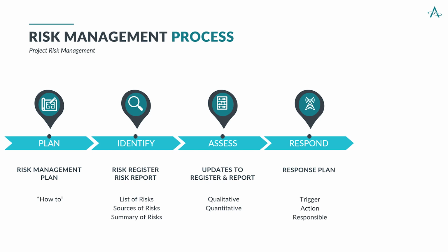Well, we need to now develop a plan on how to respond to them. So even before the risk turns into an issue, we already know our response to that. First of all, we need a trigger. We need to say, this is the starting event from turning a risk into an issue. It should definitely be an objective measurement, because everyone can say, well, it's definitely going to happen. I think it's going to happen. It's really close. Rather, we need an objective measurement. For example, we could say production has slowed to a certain number. That identifies it. This many resources have gone out sick. Now that triggers a response.